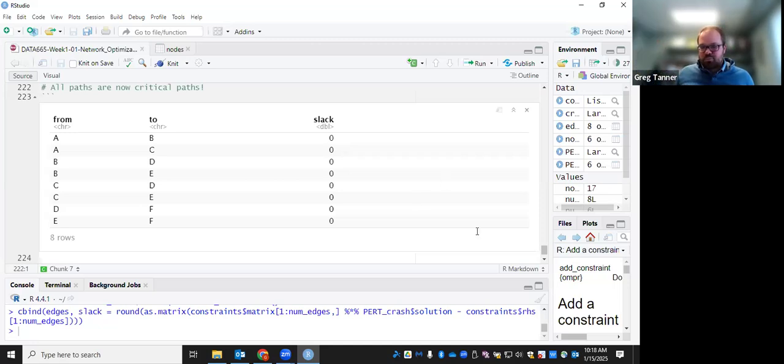Okay. One thing I will note is that PERT CPM assumes that these parallel activities have parallel sources of labor. If it's just one person doing it, usually you can't do a lot of these things in parallel, and so you end up with one long path of activities that need to be done.